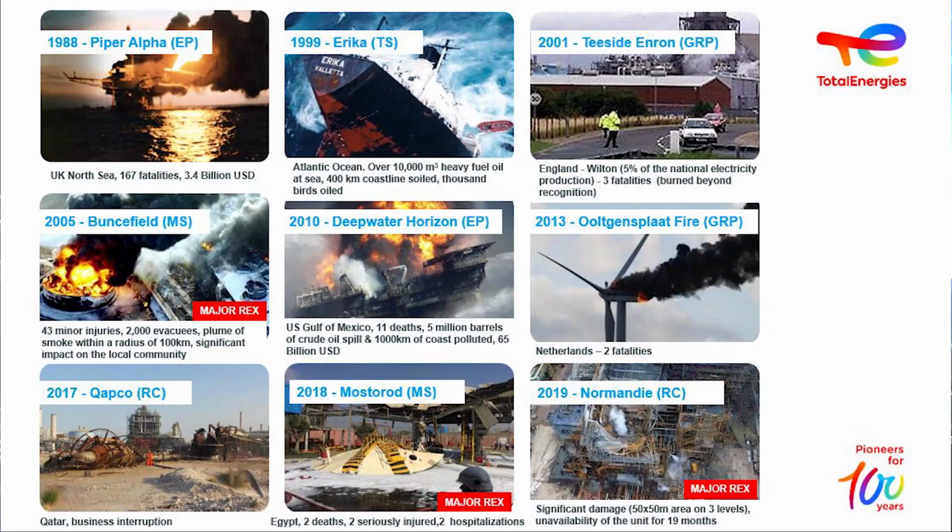So they tried to plug the hole, which is like a small pipe where the PRV was removed from. And during the process, there was no proper handover. A leak occurred. About 30 liters of product, or condensate, leaked into the platform. This led to an explosion, followed by another explosion, and 167 people died in that incident. It was one of the accidents that led to improvement of HSE practices in the oil and gas industry.